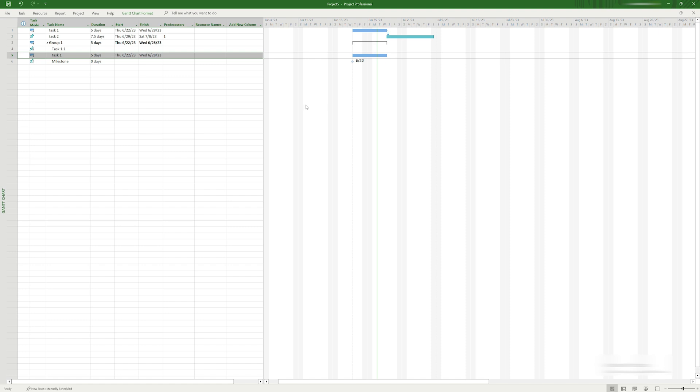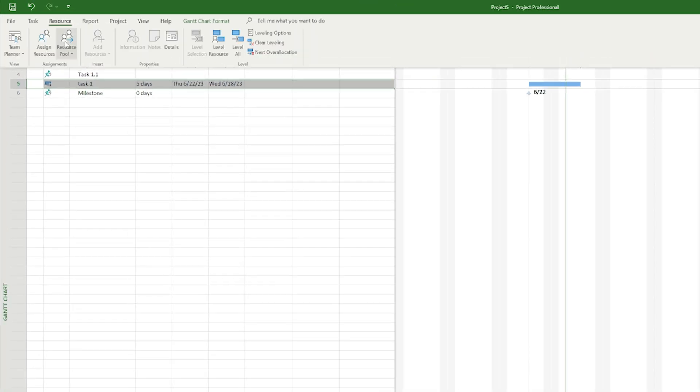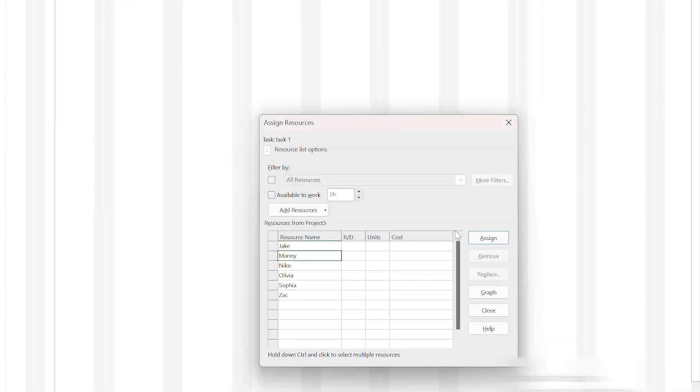Your project work will not get done unless the people or teams responsible know they have work to do. In Project, these people or teams are called resources, and they can be individuals, internal or external teams, subcontractors, or even equipment that needs to be scheduled. You can assign them to tasks by selecting one or more resources from the dropdown list in the resource name field in the task list. Resourcing is a big topic with MS Project, and we'll get much more into it in a future video.